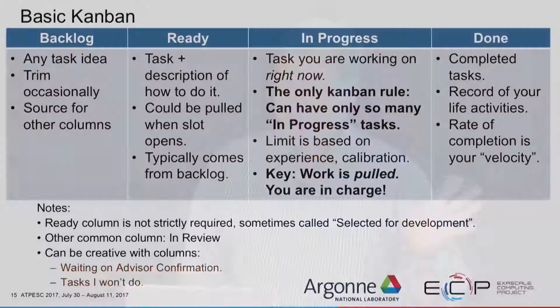Here is a typical basic Kanban board. You have a backlog — any task you're going to do at some point in the future, even speculative. You can go back and trim your backlog later. The next column is items where you know the scope of the work and they could be picked up into in-progress at any time — these are your ready items. If you had an open slot, you could pick up an item from ready and get started.